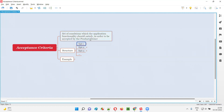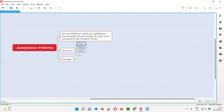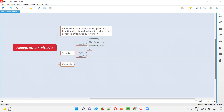For whatever application the product owner is deriving the requirements, first the product owner will derive the higher level requirements of the entire application in the form of epics. Each and every epic is a higher level requirement. This each and every higher level requirement — that is, epic — can be broken down into smaller requirements, smaller chunks of requirements, known as user stories. In agile projects, you will get the requirements in the form of stories.